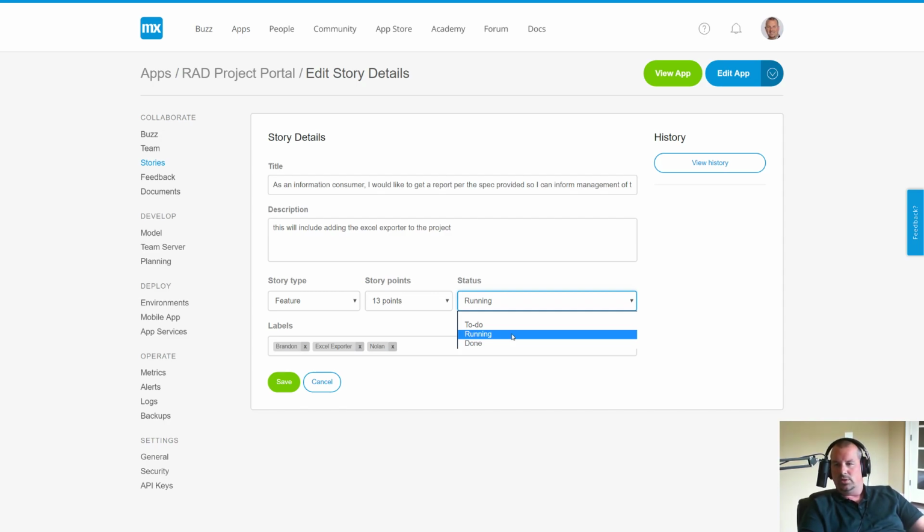A developer finishes, they do their unit testing, which is just that in an isolated vacuum, they look at that specific story and say, does it work to how we expect it to work? Well, you don't want them to click it done because it's always going to work. They wouldn't say it was done if it didn't work for them in their unit test. You want to always leave that to your either professional testers, hired testers, internal testers, or in other cases, especially for smaller projects, you can just have your product owner specify that as done.